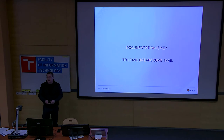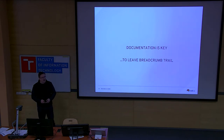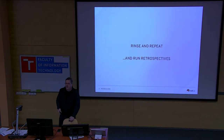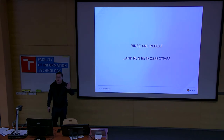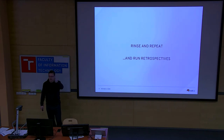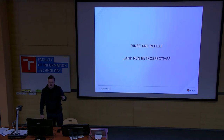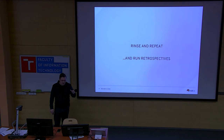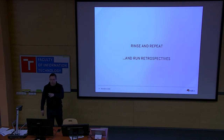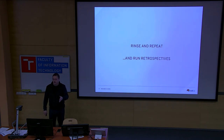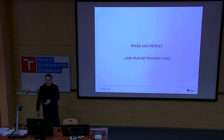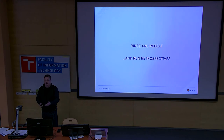The next lesson is rinse and repeat. In the RHEL 7 schedule, we did Alpha 1, Alpha 2, Alpha 3, and Beta. We found a way to repeat certain parts of the project to run retrospectives on each piece. After Alpha 1 we ran a retrospective — it was hard to do — improved the process a little, ran Alpha 2, ran a retrospective, improved again. By Alpha 3, I as program manager didn't even notice it happening because the team already knew what to do and was running like clockwork.